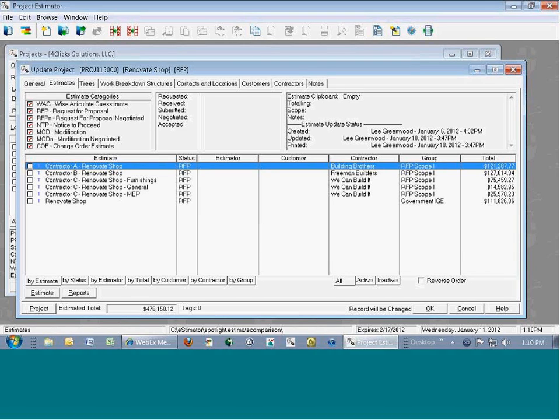They use rather large Air Force wide single or multiple award contracts. That's where multiple contractors can possibly bid on the same project, come out, give you an estimate, and you still have to compare them. You know why? Because if you forget something and you award it, they're going to probably get you with change orders.